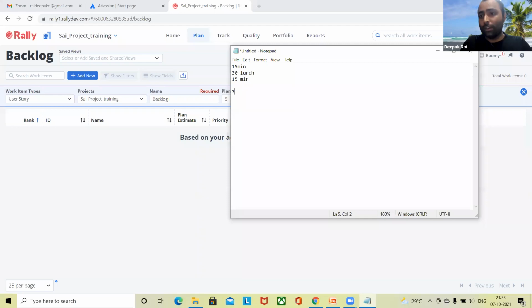And if you have any other work which you need to focus on, then you have to subtract those hours from here as well. Let's say if you have 2 hours of work in some other project, then 7 minus 2 becomes 5. It means you have only 5 actual working hours. This is a major important concept which is handled by either the Scrum Master or the product owner. In some cases, it will be handled by a business analyst who will track how many hours that person is working in the project.